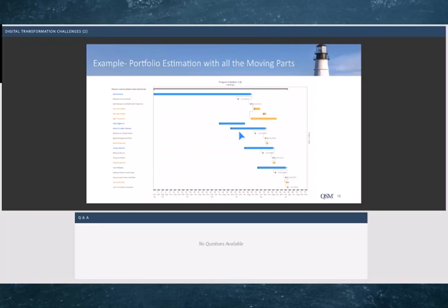You can see this particular bank has multiple vendors working for it. This is actually a bulk release. This is the biggest system, the biggest vendor work that was done. We've got a data migration cost and schedule here. We've got smaller vendor work going on with the smaller batch releases. We've got actually data freeze, security freezes that stopped for months as part of the overall process that they had to follow to make this development process work. So you can see here, this was an estimate for the overall portfolio.